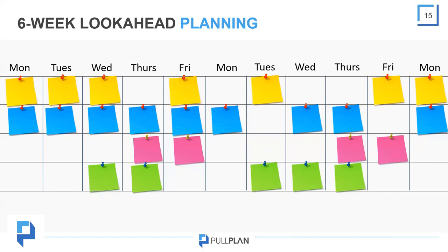As we start to produce look aheads, we take a closer look at constraints and work toward resolution. Constraints are a lot like roadblocks. Where they exist, they're going to prevent work from being completed. When teams have to deal with constraints when they're supposed to be completing tasks, the result is often productivity loss and waste. So by sequencing tasks out by day, the team has a great opportunity to review task durations, discuss what is possible and reasonable, and work collectively to sequence task handoffs and define expectations.